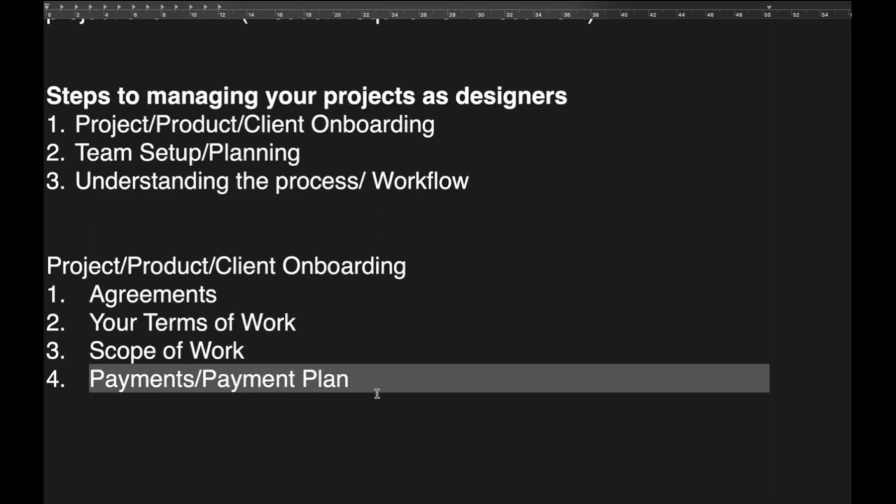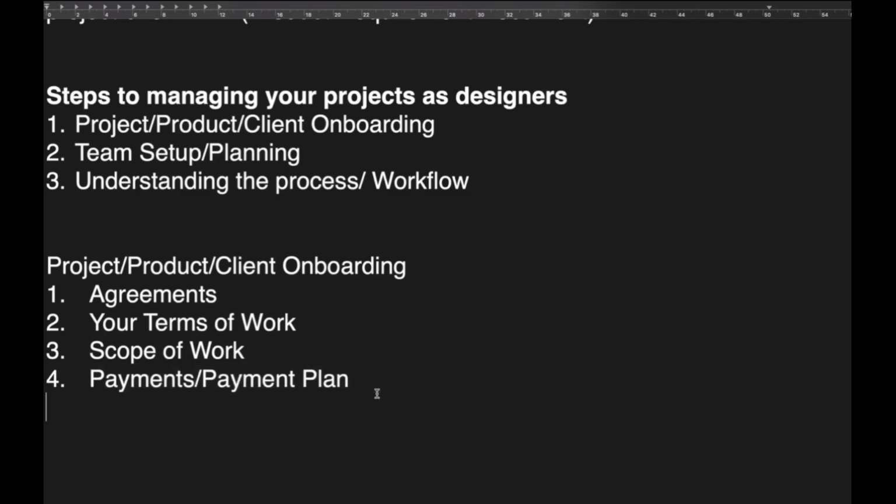You need to put this payment plan into stages, right? So you can say before we kick off this project, we'll definitely need 50% of the payment. Probably during the first review, maybe you have three stages, right? I showcase, then I implement, and then you review, and then we'll finalize. So that's kind of like 4 steps. So you can say at some certain stage in the project, we get another 20% or maybe 25%. Then when we close finally, we get the remainder 25%, right? So you should learn to put this in.